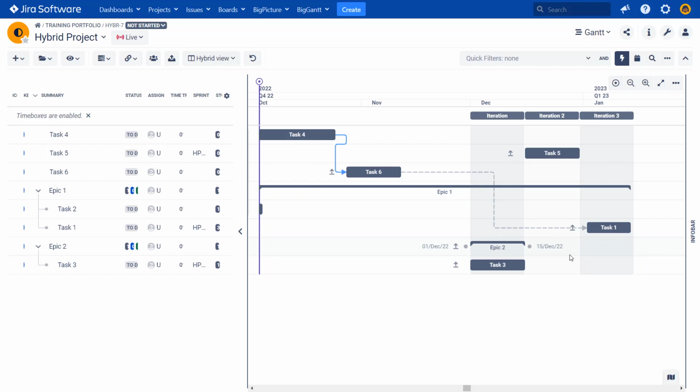So we are actually able now to see the plan for the tasks planned in the waterfall, plan for the tasks that are planned agile, so we see in which iteration each task is done, and we see the dependencies between the two, so we can try to move around the tasks to make sure that all of them are done in proper order and everything is as it should be. No problems with our plan will occur.